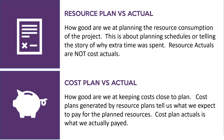While there are many places in ServiceNow that talk about planned versus actual in different contexts, we see comparisons made most often in two places. First, the resource plan. When talking about resource plan versus actuals, we're discussing how good we are at planning the resource consumption of the project — about planning schedules or telling the story about why extra time was spent. Resource actuals are not cost actuals, so looking at actuals versus planned is really about seeing if our estimates were good from months ago.